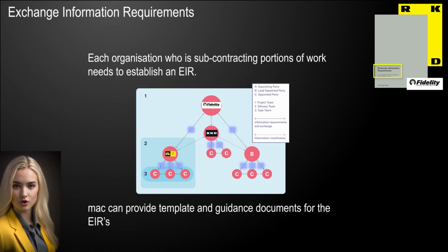A significant focus is establishing the EIR. An organization that wishes to subcontract work needs to prepare an EIR for that work. In doing this, they need to consider what they are engaging to provide. Each organization who is subcontracting portions of work needs to establish an EIR.